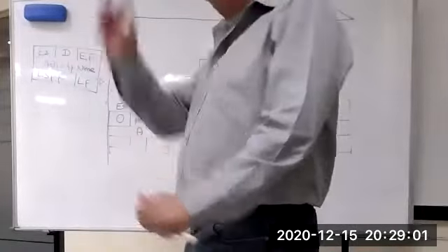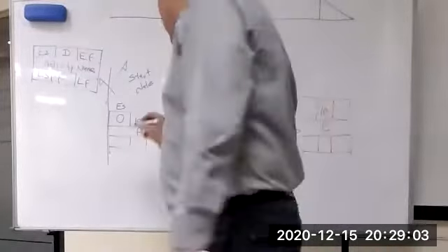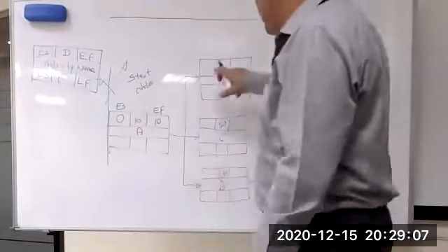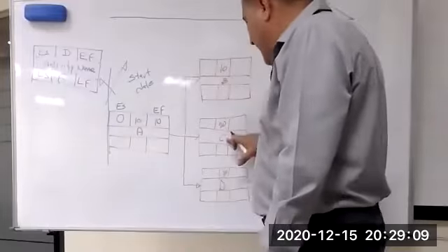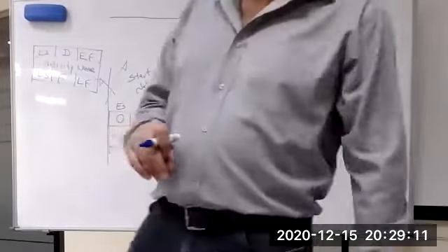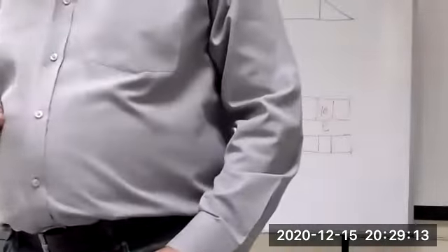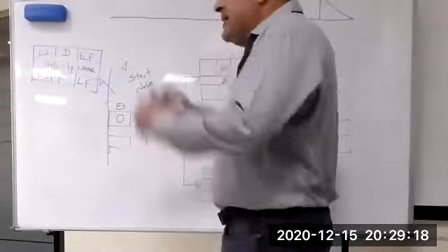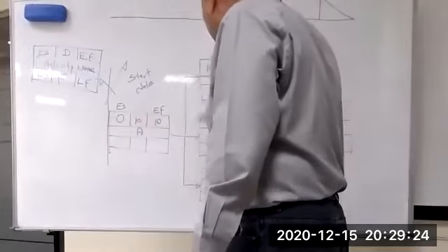Early finish is after 10 days. And activity B, activity C, activity D all start when? They start after this finishes, in the same day, the end of the day, by 10.